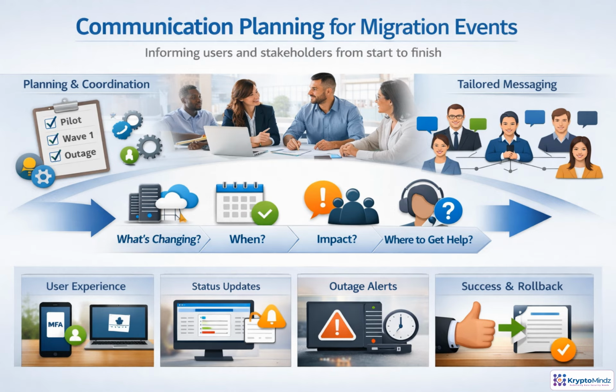Communication planning turns a migration from a surprise into a managed experience. For each pilot, wave, outage, authentication change, or policy update, define what people need to know: what is changing, when it happens, how it affects them, and where to get help. Tailor the message to the audience.